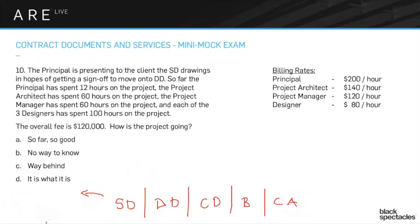Before the contract formally begins, there might be programming work, feasibility studies, or marketing drawings for fundraising. That pre-contract work would either be specifically delineated in the contract with an extra fee, or handled under a separate contract altogether. The formal contract essentially starts at SD.